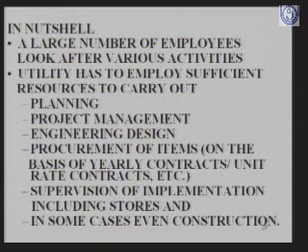This means the utility which is executing a project on a rate contract basis is doing a lot of activities itself. Now in a turnkey contract, I want to delegate this responsibility, I want to delegate this work to the contractor, and I want to only have central control over him. And that is what it means. With my limited manpower, I would be able to execute a large number of projects which otherwise would not have been possible when I do the contract on the unit rate basis.